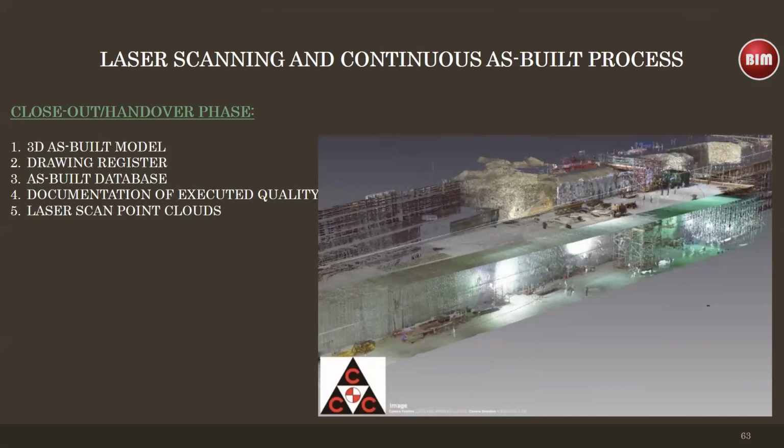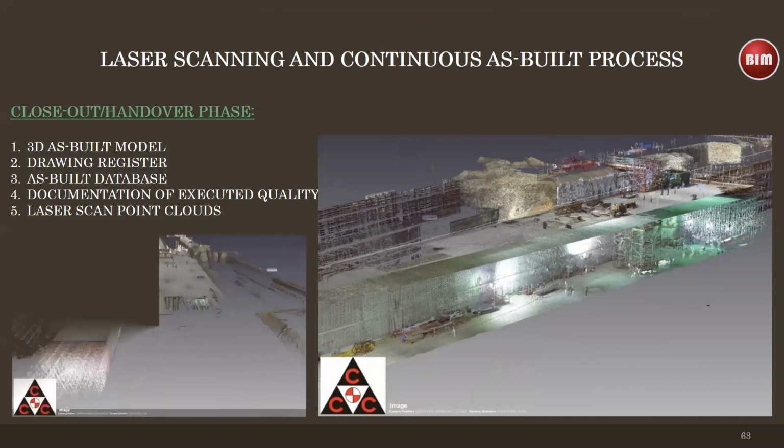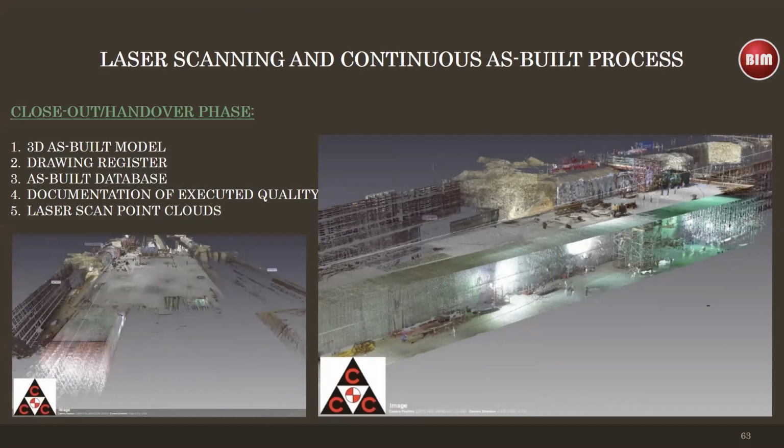We have implemented laser scanning extensively and continuously to ensure that everything that is built is captured, and the as-built process is happening on the spot. And we update our models continuously to reflect the as-built condition on site. As you can see, those are different point clouds from that project.